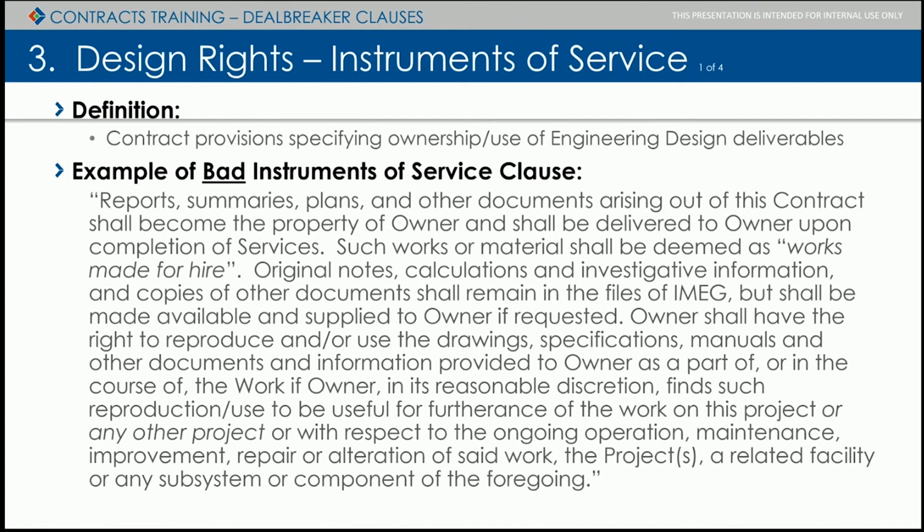and things go wrong. Depending on the wording in the contract, if we're not indemnified for that action, or we don't specify that our instruments of service and deliverables are for use on that project only, we can be opened up to that liability. I have seen it happen. So that's a summary of a bad instruments of service clause, okay?